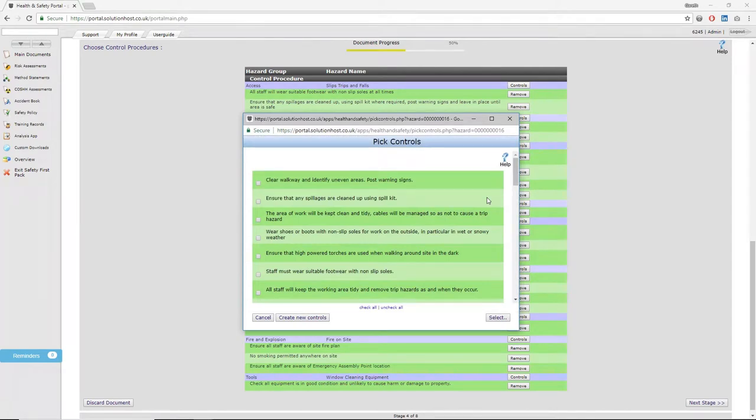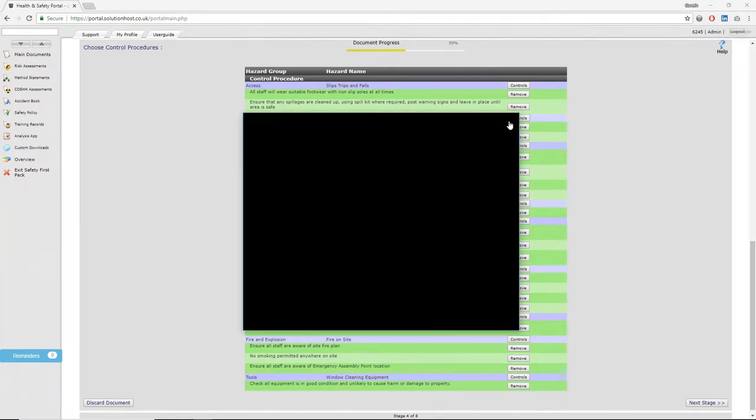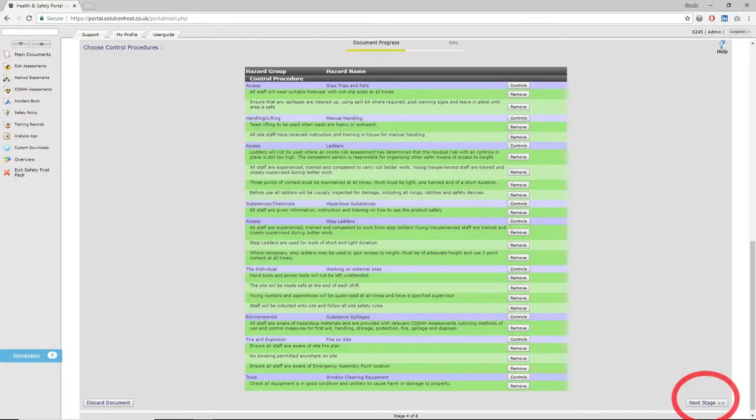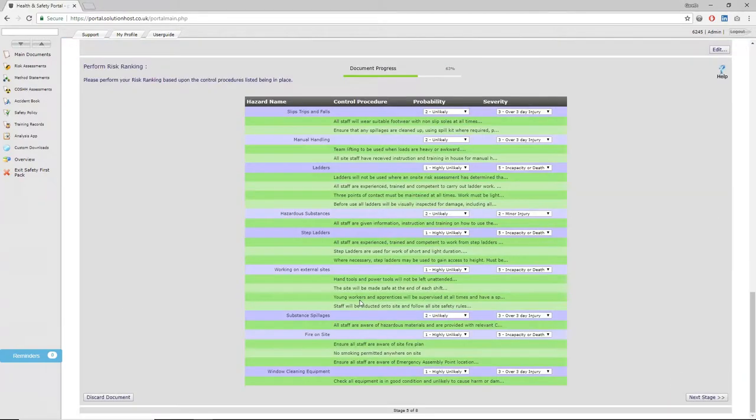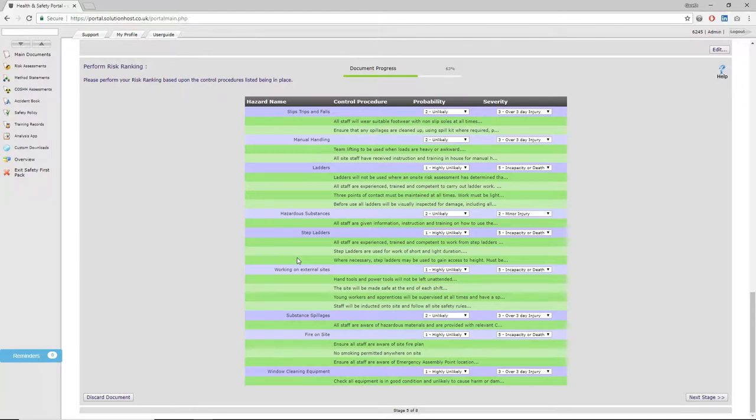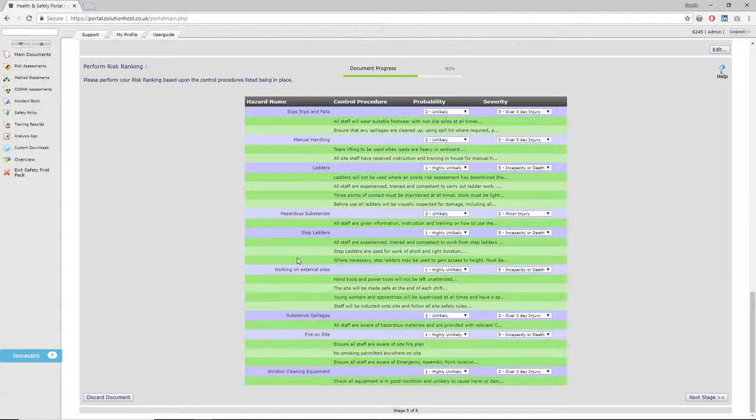Once you're happy with this, click next stage. The next stage is risk ranking. Now that you've put in place control procedures to mitigate the particular hazards, it asks you to select from a pre-designed list to outline the probability that there's going to be an accident or incident regarding that particular hazard, or what the severity is likely to be if that hazard becomes realized. Click next stage when you've done this.